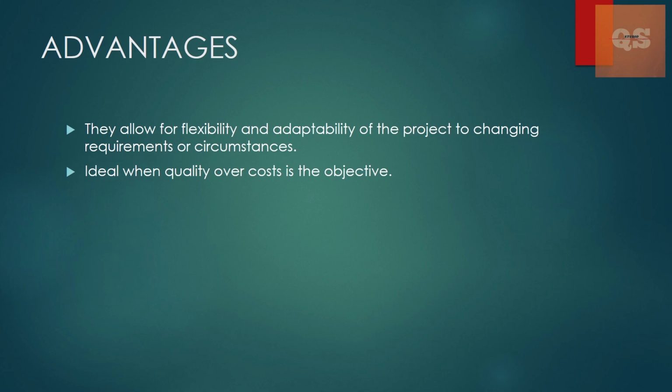And since the cost depends upon the actual work executed, all the backups of the cost spent will have to be shown to the client or the consultant appointed by the client to oversee the project. Only then can they determine the final cost using all these backups. The proofs are there and all the costs are in front of them. It is actually transparent and the quality of these works is not compromised.